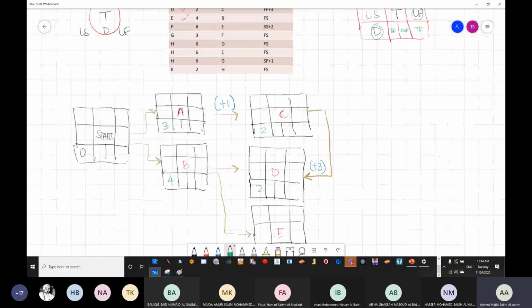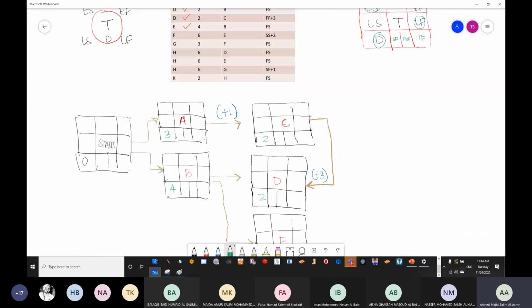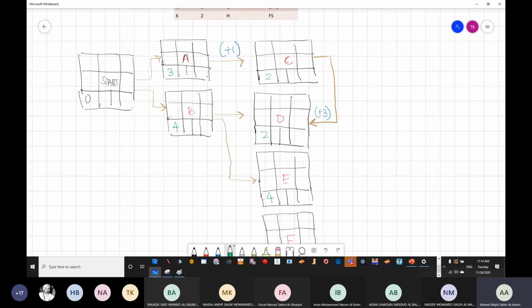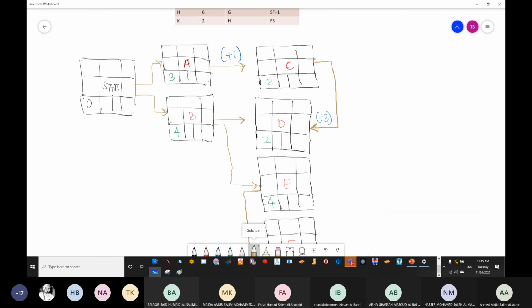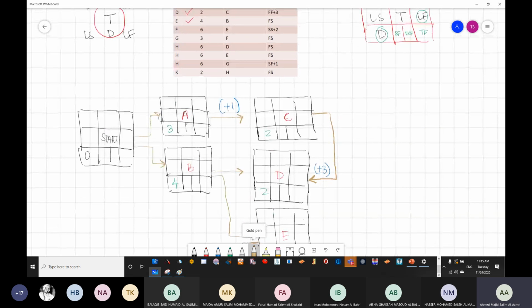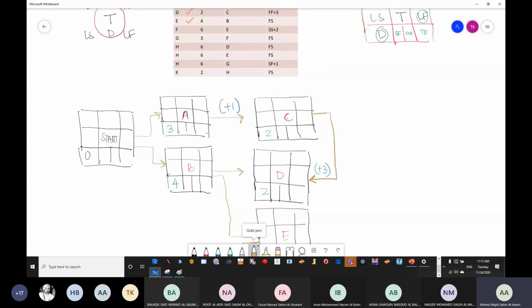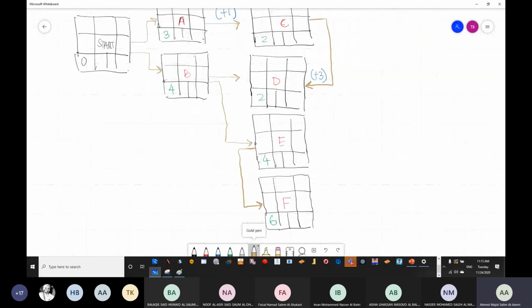What is the relationship? The relationship is start E to start F. So it is from the start of E to start of F. It's only a matter of knowing the arrows going from where to where. And then we have +2. So we're going to write it as +2.